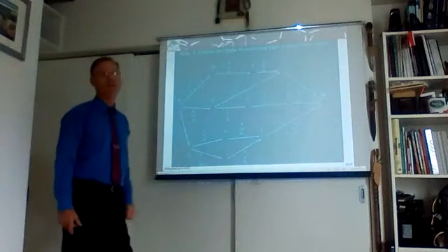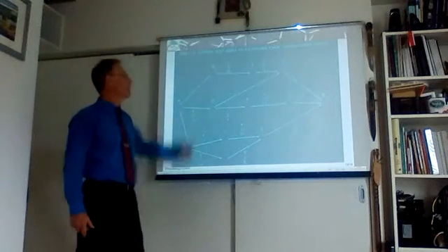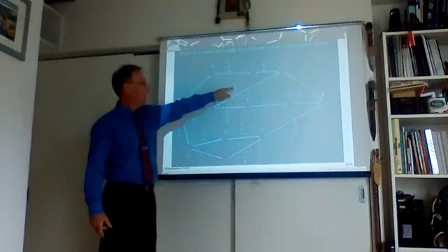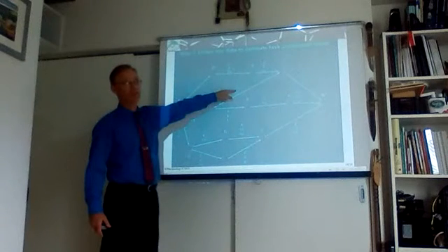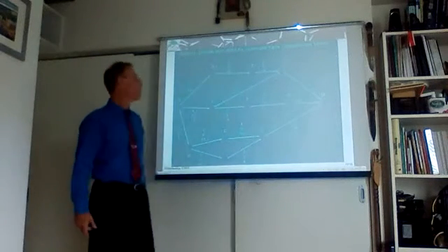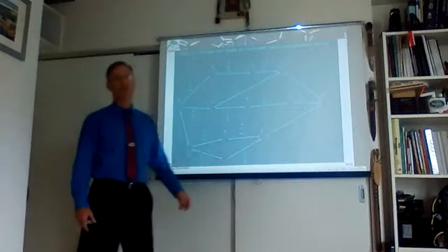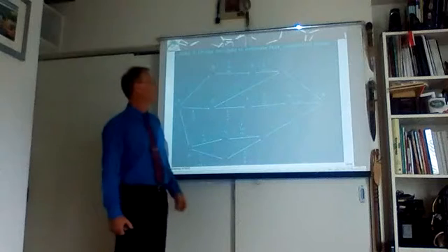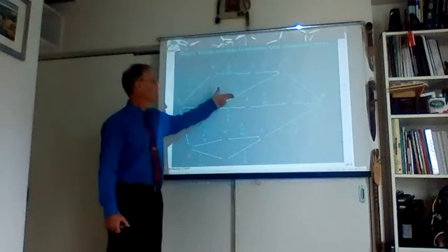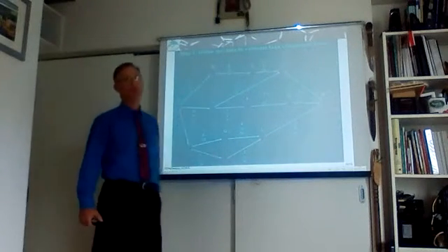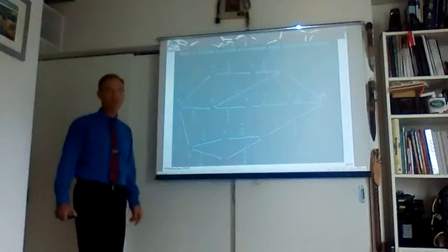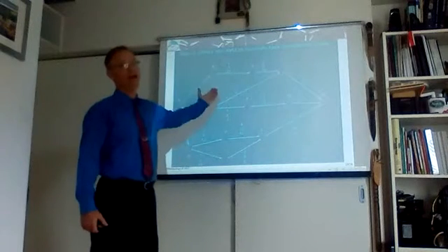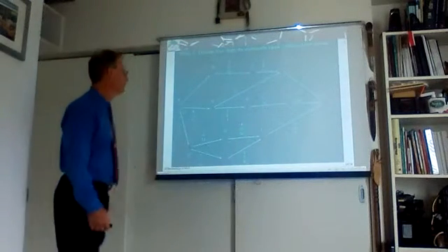Based on that, we will calculate the estimated time. 5 plus 25 plus 4 times 10, it's 30 plus 40, which is 70. We will divide 70 by 6. One for that, 4 for that. 70 divided by 6 is the estimated time.